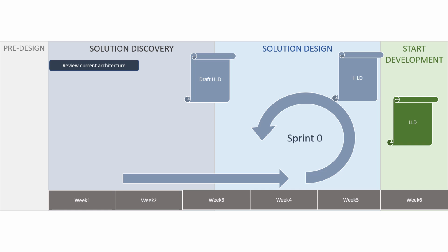In solution discovery, the solution architect will start the design work, understand the context, schedule the quality attribute workshops, review existing architecture documents, etc. A solution architect will do as much research as possible to explain the current or baseline architecture and also what is needed to build the target architecture. At the end of the solution discovery, solution architects should be ready with a draft solution design document. This draft design will include a target design also, though it will still be fluid.